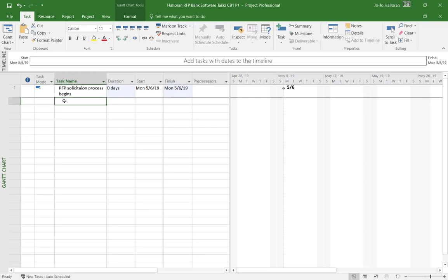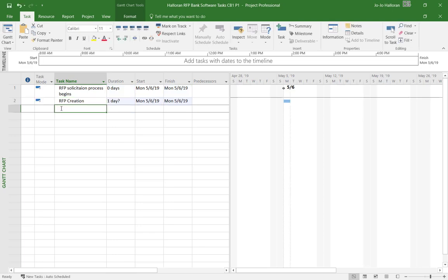Okay, and our next task in here is RFP creation. And we don't have any duration on that because that's going to be a phase, or what we call a category. So this is where it's really important: the next one here, RFP creation begins, because we want to make sure that one is actually going to be a milestone with 0 days.